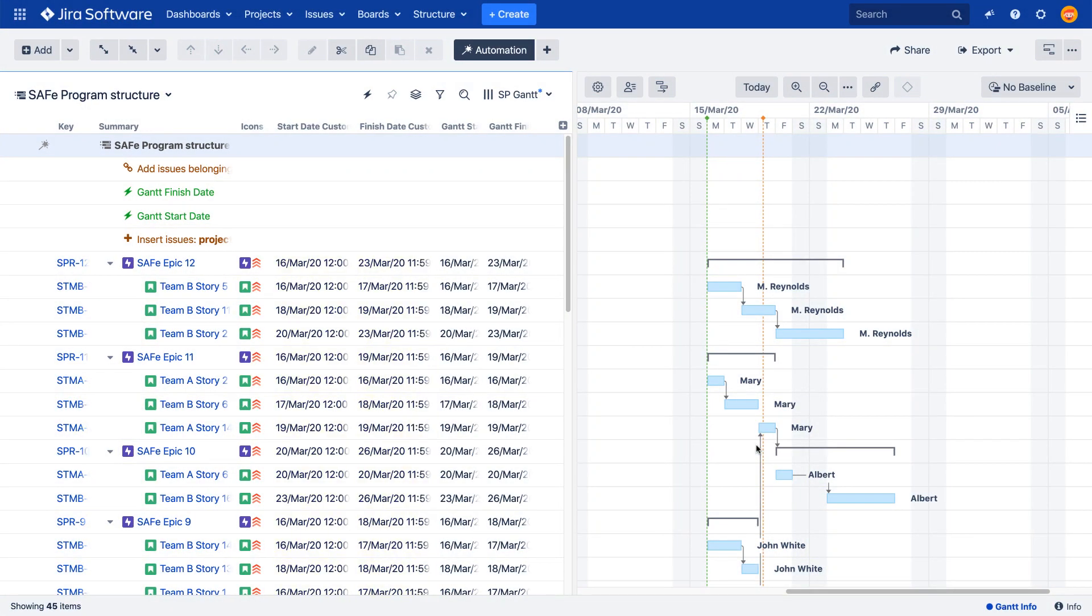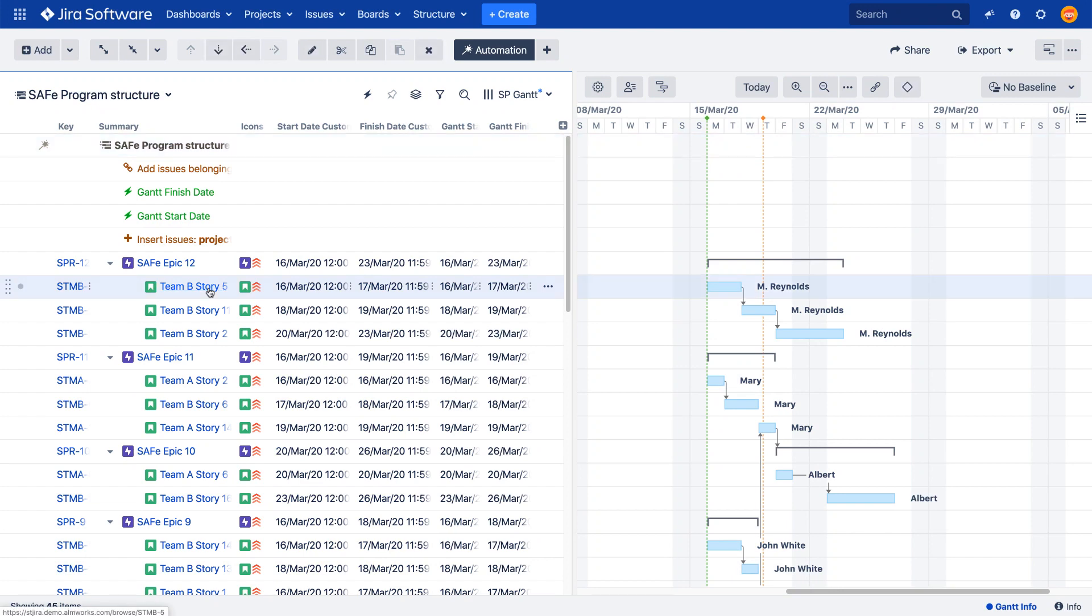After each effector finishes its run, the selected Jira fields will be updated with the corresponding dates from the Gantt chart.